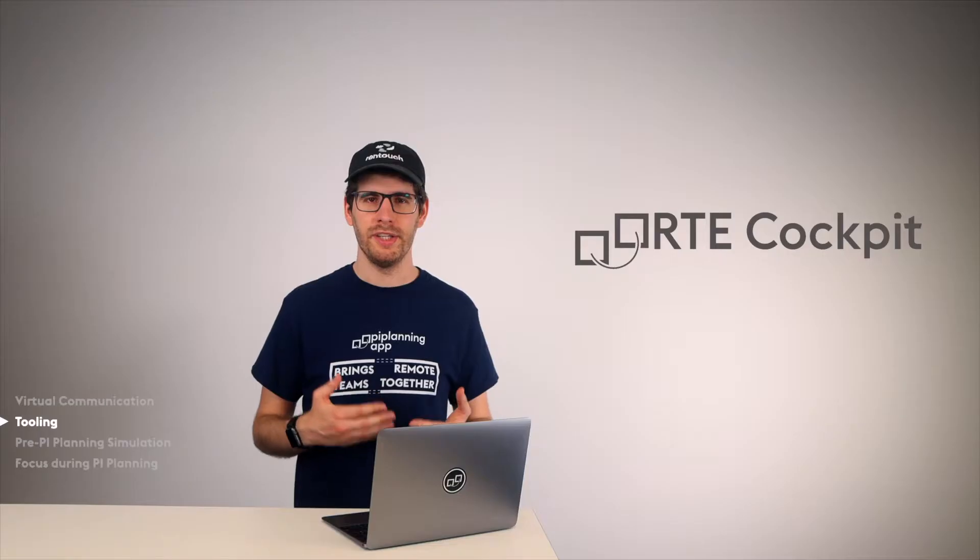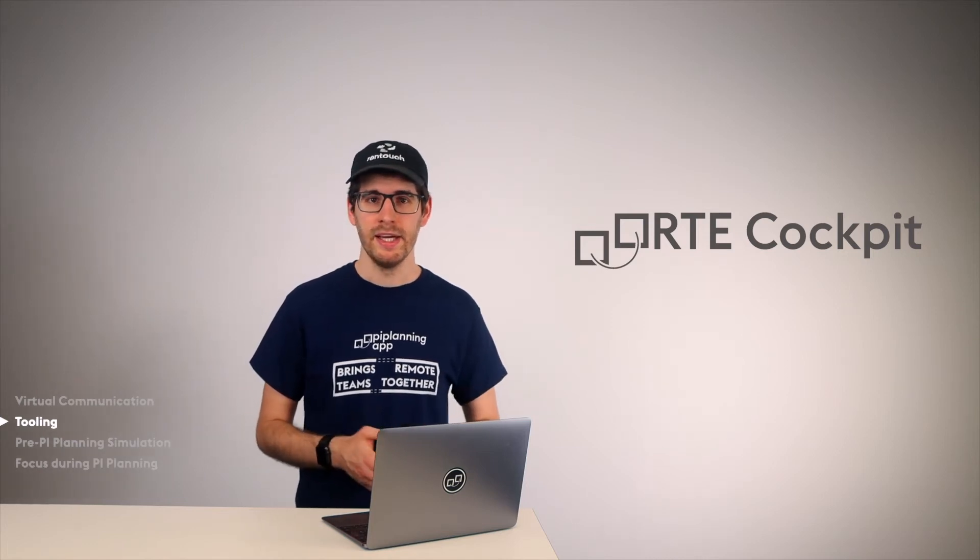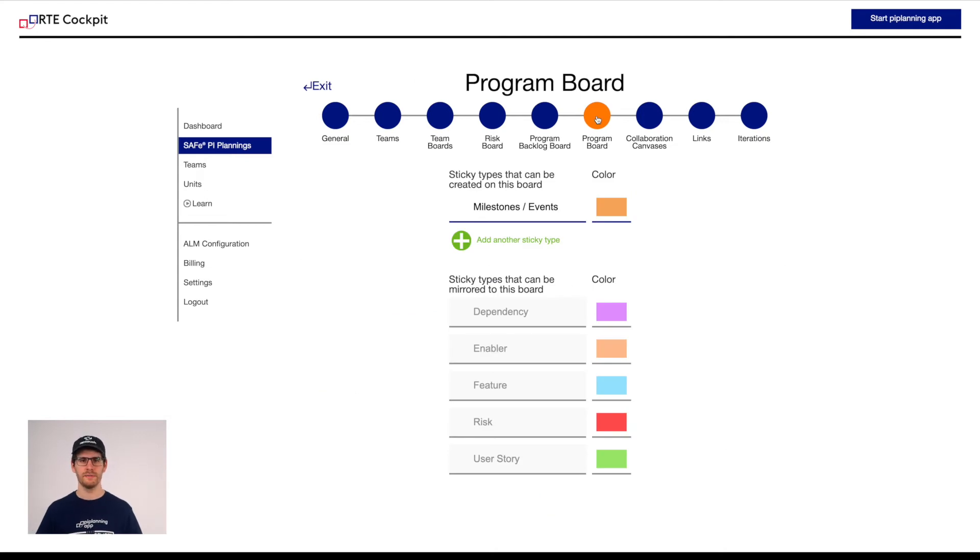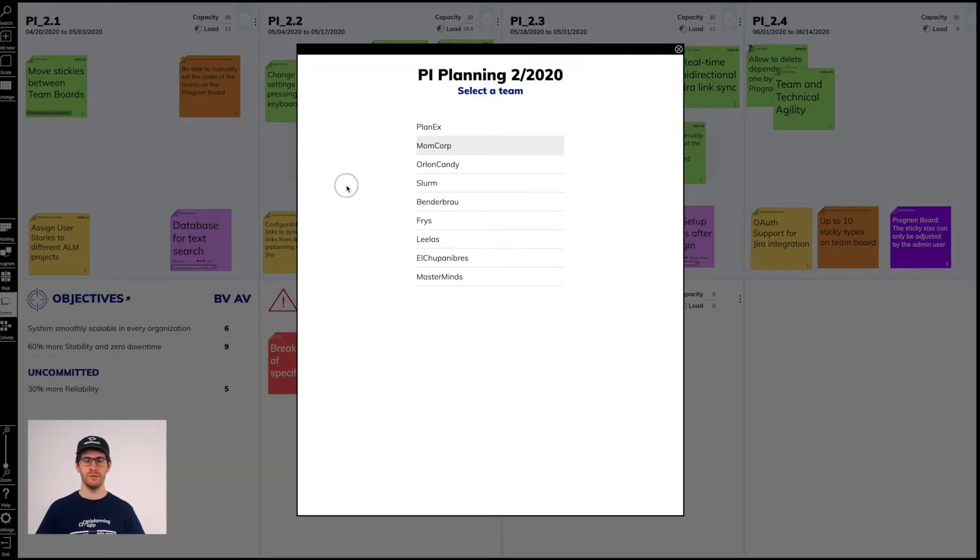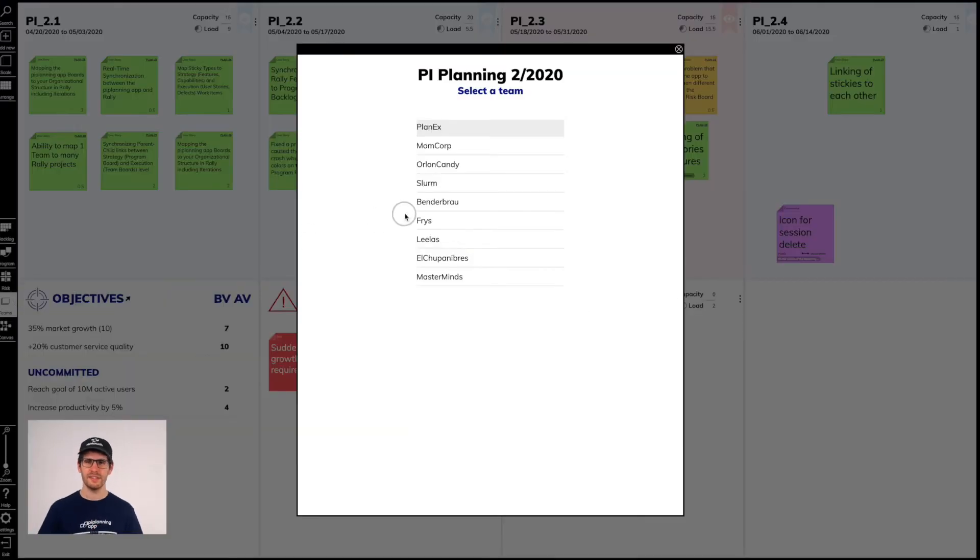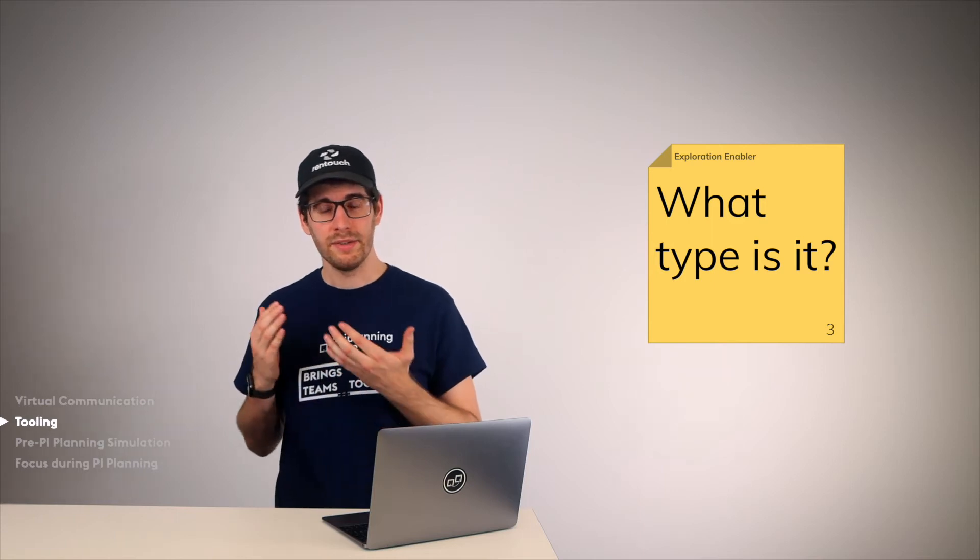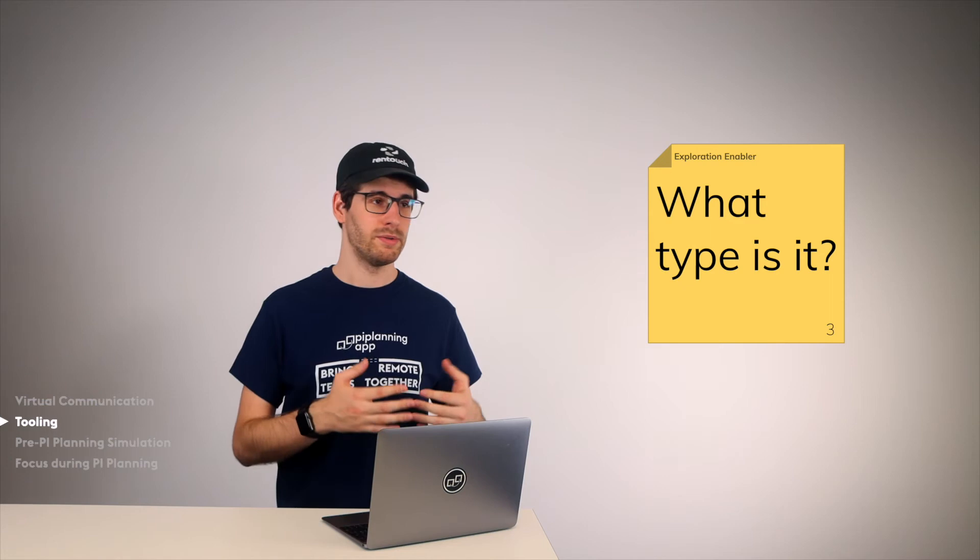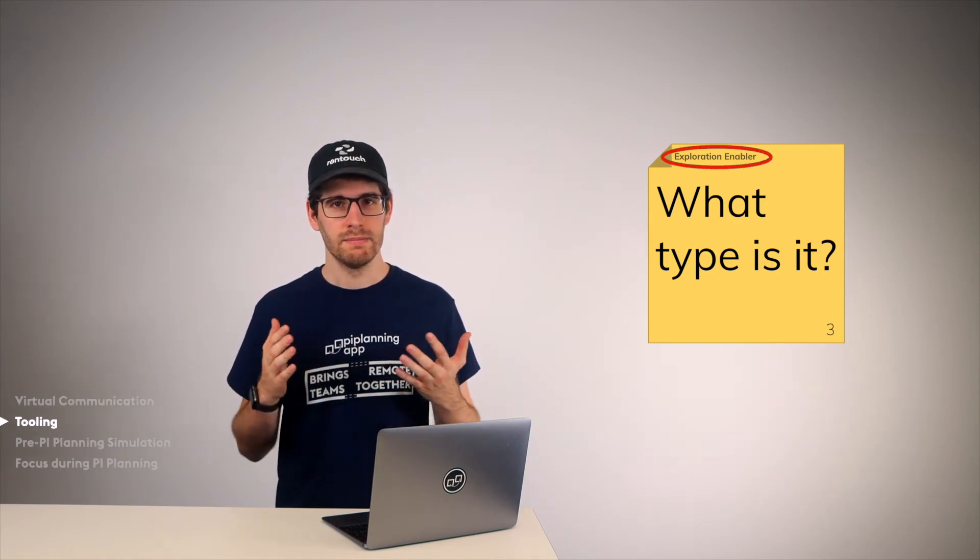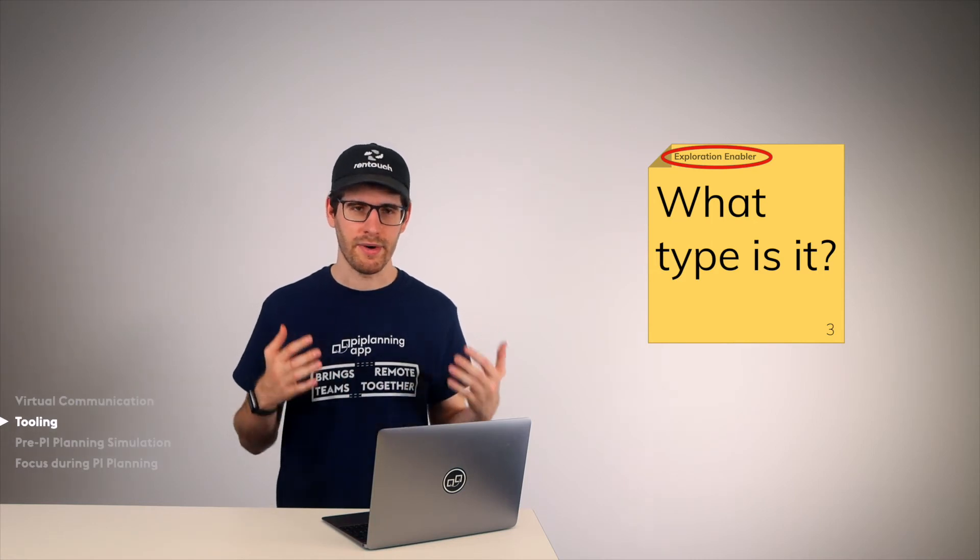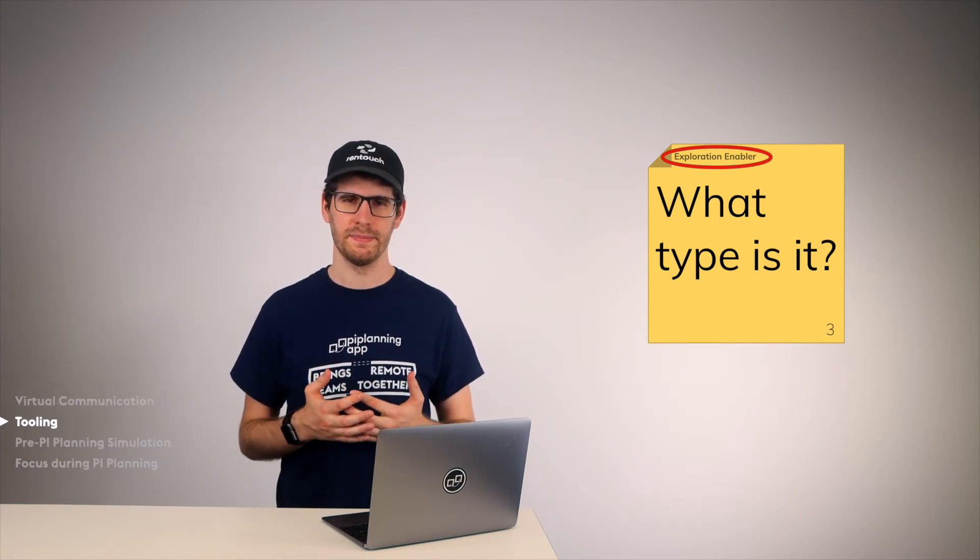In the PI Planning app, there is the so-called RTE Cockpit. In the RTE Cockpit, the RTE can prepare the PI Planning in such a way that it does not get out of hand. He can tell the teams which sticky types to use and which colors they should have. This allows all the teams to go to another team's team board at any time and instantly understand what is going on there. The time to ask whether this yellow sticky is really a user story or is it an enabler is basically omitted and the participants can talk directly about the planning related topics.